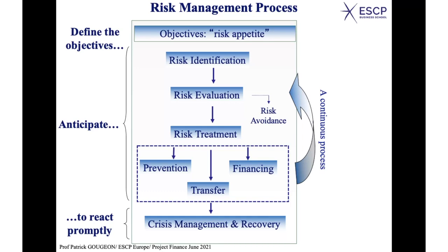You may have new regulations. You may have new functional conditions, new technologies, and so on. So what was analyzed, what was perceived in the past, may change today with the new information you have. So this risk identification, risk evaluation, and also risk treatment, all these stages have to be revised continuously to take into account the changes that might occur and affect the project.